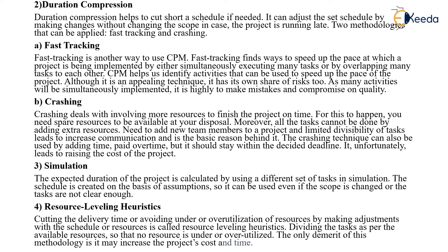Crashing deals with involving more resources to finish the project on time. For this to happen, we need spare resources to be available at your disposal. Moreover, not all tasks can be completed by simply adding extra resources. Hence, the need to add new team members to a project and limited visibility of tasks lead to increased communication overhead. The crashing technique can also be used by adding time or trading over time, but it should stay within the desired limits. It unfortunately leads to the raising of the cost of the project.